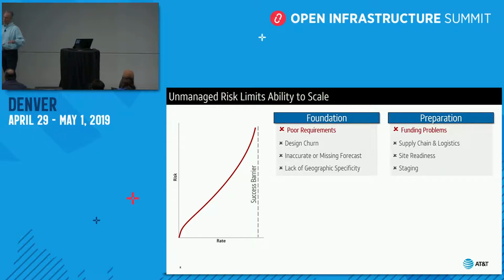This was before we got into really heavy OpenStack, more in traditional routing. Our equipment started to get held up in customs, coming in from Mexico as well as from China. It was a surprise to all of us. So try to anticipate those things up front. Ask those questions before you attempt to scale, before you write the check and start allocating dollars.